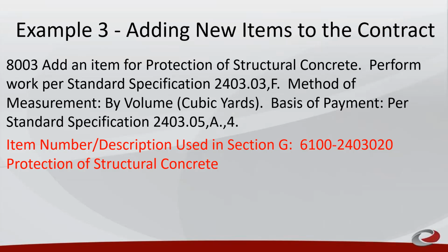Perform work per standard specification 2403.03F. Method of measurement by volume, cubic yards. Basis of payment per standard specification 2403.05A4. Item number, description used in Section G, 6100-240-3020, protection of structural concrete.